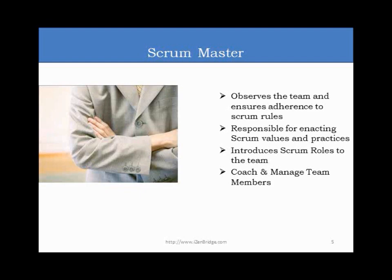A new team is at the Shu stage, where the Scrum Master needs to play the role of a teacher — teaching the team the Scrum rules. When the team reaches the Ha stage, the Scrum Master plays the role of a coach, creating a supportive environment where the team can grow and perform their duties. When the team is at the Ri stage, the Scrum Master works as an advisor — only interfering when asked, only advising, while the team takes the final decision.